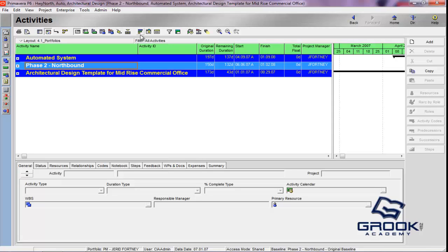is very helpful, because when you get to the point of administration and you want to limit what people see, you have multiple sources of input, multiple contractors, multiple internal sources like project managers, assistant project managers, project directors. You can break all their activities out into their own personal schedule, and then using user privileges, and determining what they can actually view, you can give them their own view of just their project.